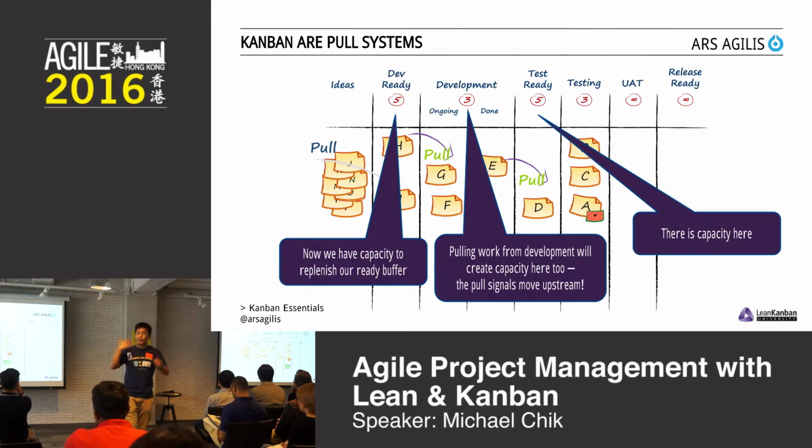So in reality, the kind of work that we do, knowledge work, work that mostly happens within our minds, our heads, we often use virtual Kanban boards, something like this, to visualize our workflow. Scrum boards, which only have 3 columns, to do, doing, done, are probably a very, very simplistic form of a Kanban board. I think technically it's not really a Kanban board because it does not show you your workflow. It's more a task board.